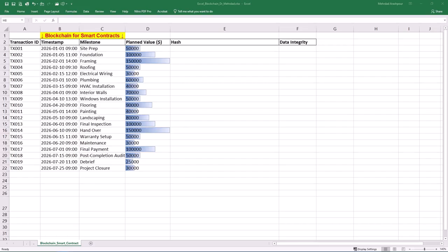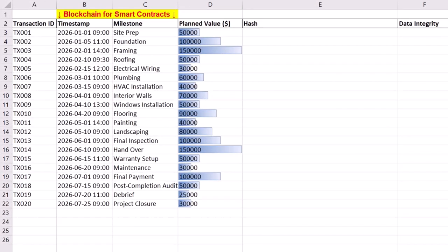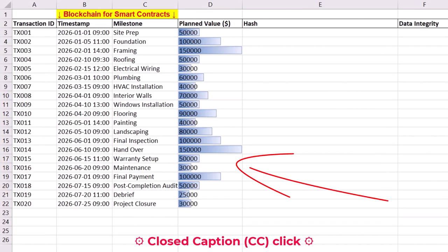Step one is hashing and data integrity checking. Our case study focuses on a construction project which is managed through smart contracts. In this project, our aim is to use blockchain to record transactions and control the release of payments based on project milestones.